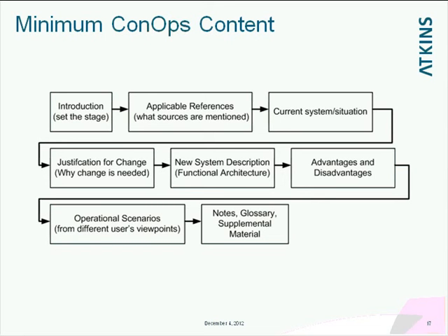And then you talk about what the current system or situation is, why you want to change it, describe the new system in a functional architecture description, and that gets into another lecture about how you do system definition and their different techniques and things like that I can't get into right now. And what are the advantages and disadvantages of the new system? And then talk about operational scenarios from the different users' viewpoints.